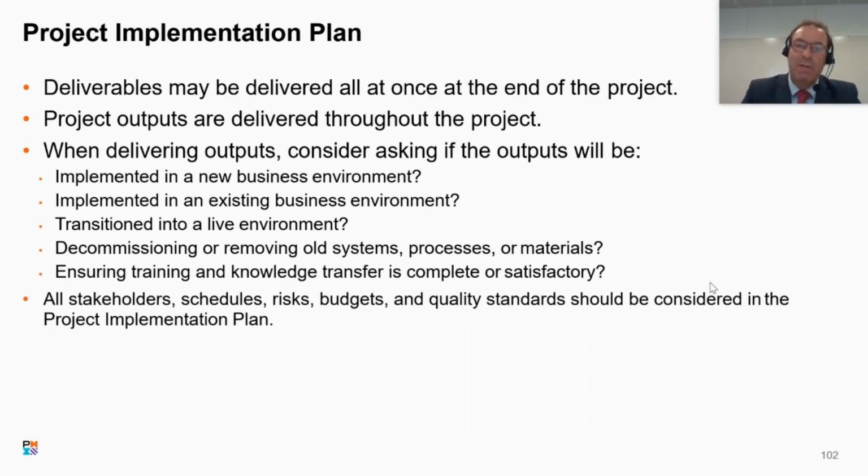There's a friend of mine who was involved in program managing a housing construction site, which was in the Greater London area. And it was quite literally hundreds upon hundreds of apartments. It doesn't matter where it was, but it's not far from the River Thames. And you kind of think the 100% drop, build all the apartments and then sell them all and get people to move in all at the same time. Or as they completed floor by floor, they were selling the apartments and making them, where it was safe to do so, available for people to move in. And this was a great way of selling off plan, because it also kept the revenue coming in. Lots of things to consider.